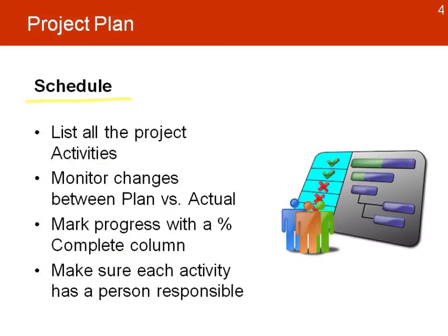The schedule is an important element of the project. That's not only where we list all our project activities with estimated durations, but it's also an opportunity to help us monitor changes between what we planned and what was actually done. Something that we use for that is to mark the progress with a percentage complete column in the progress that we make in our schedule.